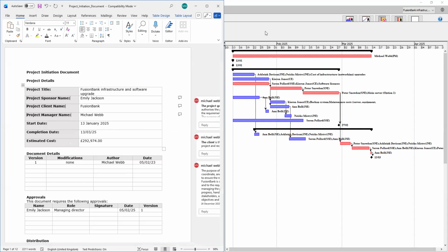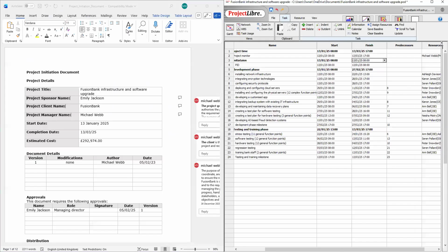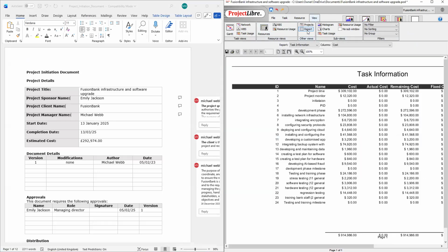All right. And then we have to look back at our view of how much it cost us. So we go to report, and we're going to look at the cost now. It's 309, so we are over budget. So now we're at 309.